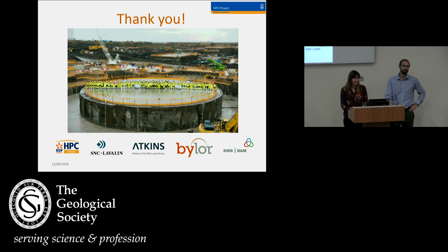Is any further work done after it's been stockpiled for 6 months? We do chemical testing on it, and we test all of the stockpiles, in situ testing especially on placement of layers. So every single layer that is placed is tested to an extent, and we have ongoing chemical testing as well for all the placements. We also test all the water management zones for the water. Does that answer your question? Okay.